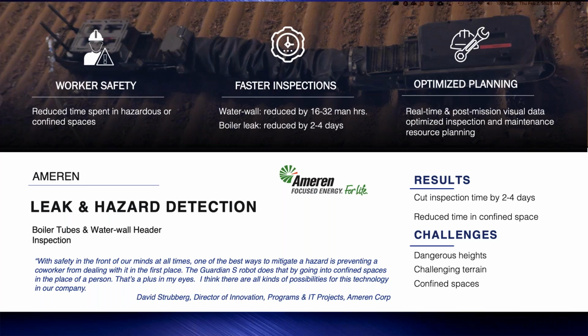And again, the boiler leak inspection was reduced by 2 to 4 days. Again, what typically could take 3 to 5 days, with early visibility into potential damages, Ameren had more time now to prepare a better maintenance plan. Again, it's all about that planning. And now understanding how long the unit would be down and purchasing replacement power sooner.